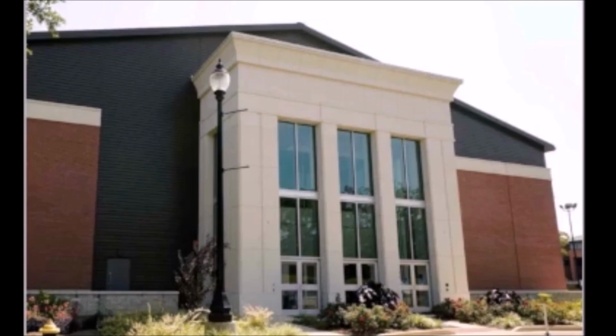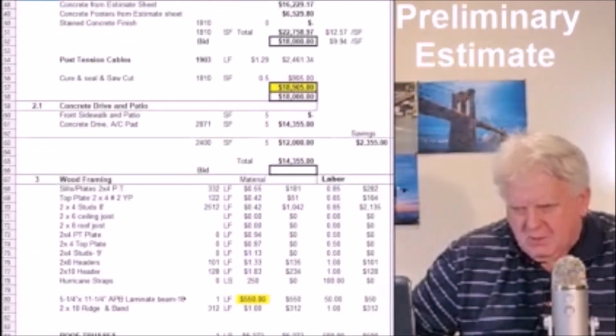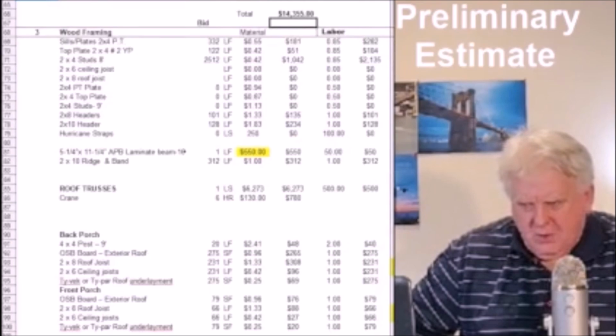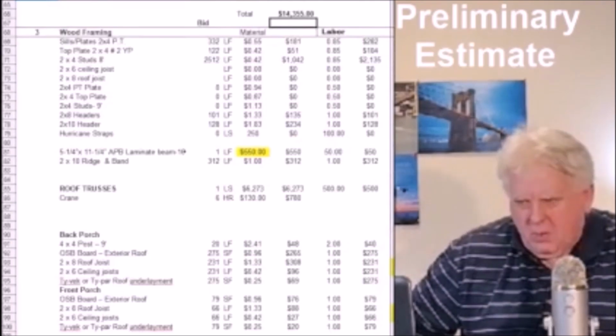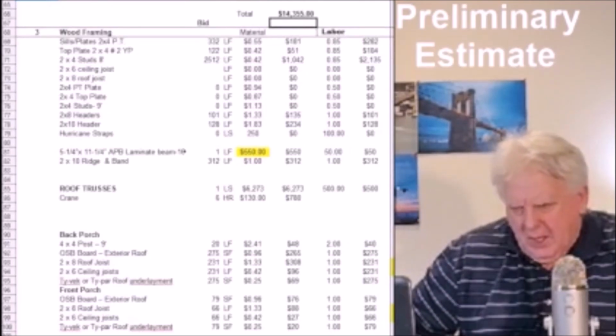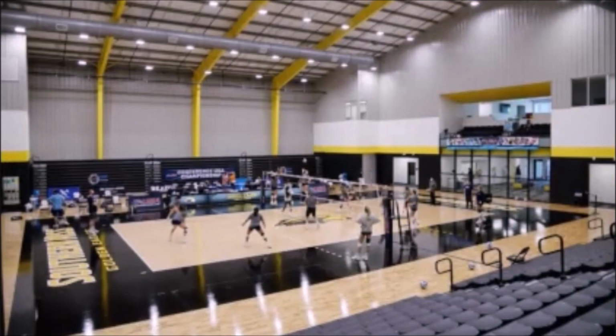But at that stage in September, October, November, you have a guy that has a little bit more detailed estimate so that you can know exactly where you stand, and then the value engineering items you put an estimate on too. And then that project manager or construction manager or contractor can work with these individual trades at that time and come up with these value engineering items. And when you get closer to the final set of drawings being completed, then you can incorporate these value engineering items into the project.